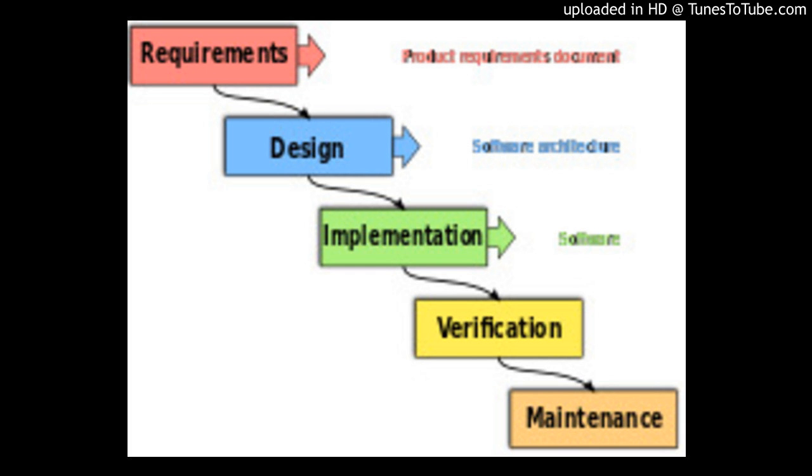Spiral development. Main article: Spiral Model. In 1988, Barry Boehm published a formal software system development spiral model, which combines some key aspects of the waterfall model and rapid prototyping methodologies, in an effort to combine advantages of top-down and bottom-up concepts. It provided emphasis in a key area many felt had been neglected by other methodologies: deliberate iterative risk analysis, particularly suited to large-scale complex systems.